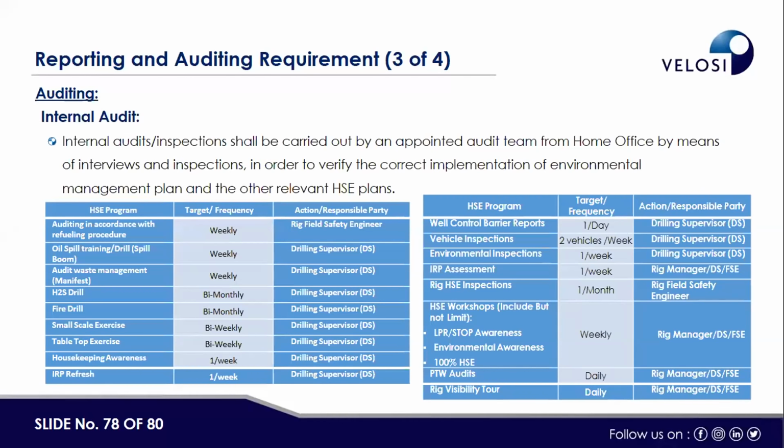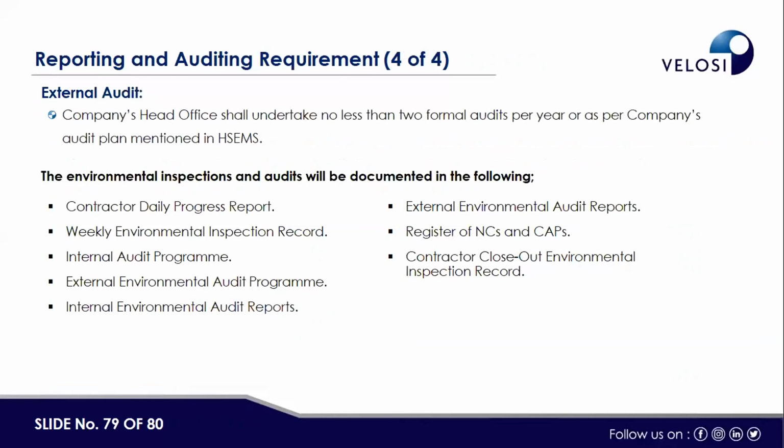All spill trainings and drills should be on a weekly basis. The H2S drill should be bi-monthly. The fire drill should be bi-monthly. So these are all the HSE programs, their frequency, and the responsible party we have developed in this plan.